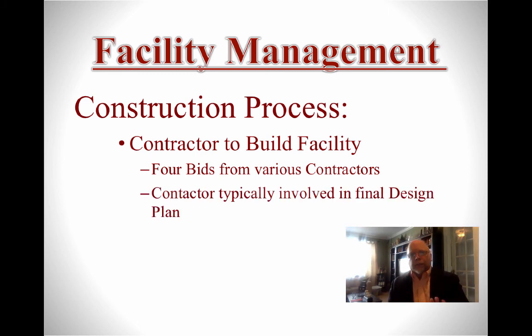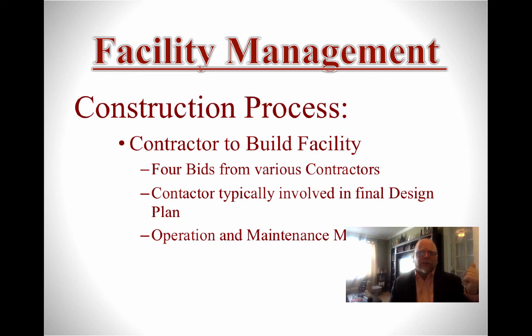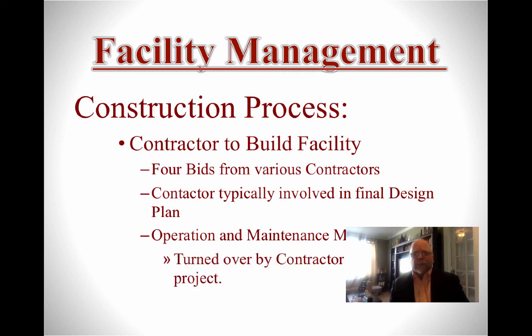Populous is a good one, and there are other contractors out there that do a very good job. They get involved in the final design plan because they know about construction. So you want to get typically 4 bids, and at the end of the construction, after everything's done, they're going to hand over to you, as the facility manager, your operation and maintenance manual. At the end of the project, they're going to give you all the information on how to run everything in the building.